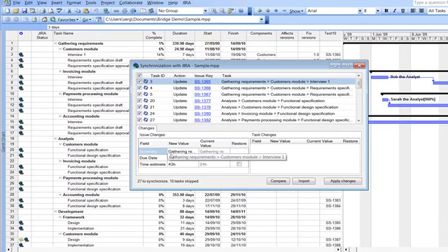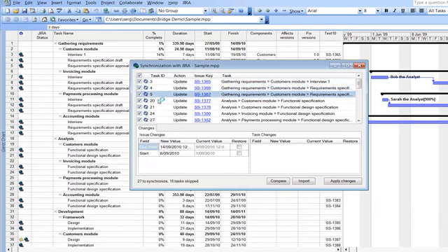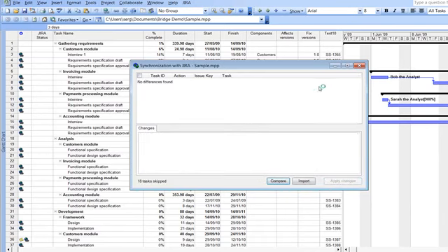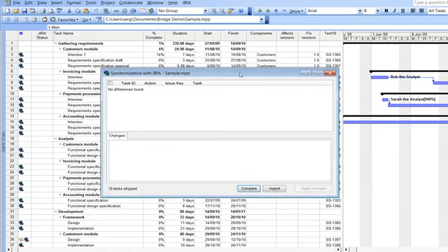That's the new name I gave it, and the due date and time estimate for this issue, because I increased the duration, and all the dependent tasks were rescheduled as well. So that's how we can reschedule tasks and update JIRA based on the information in the Microsoft project.